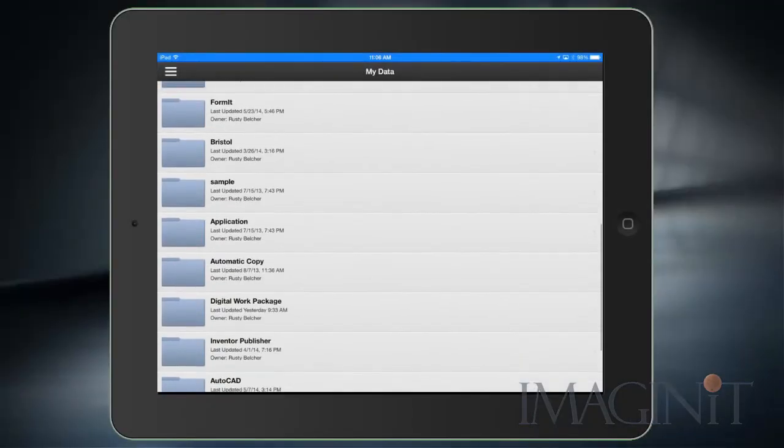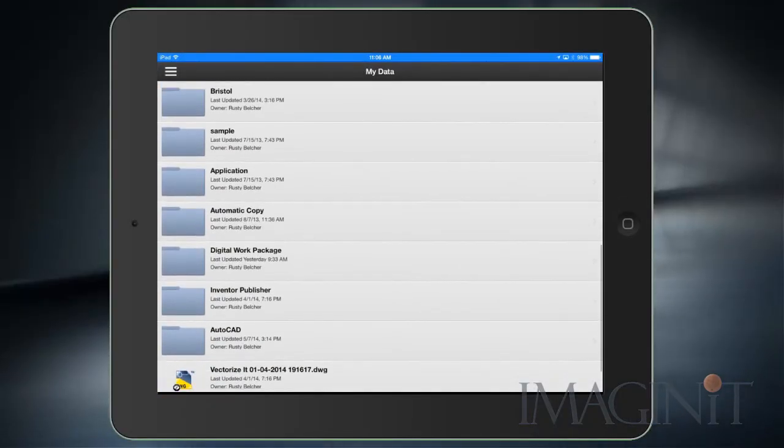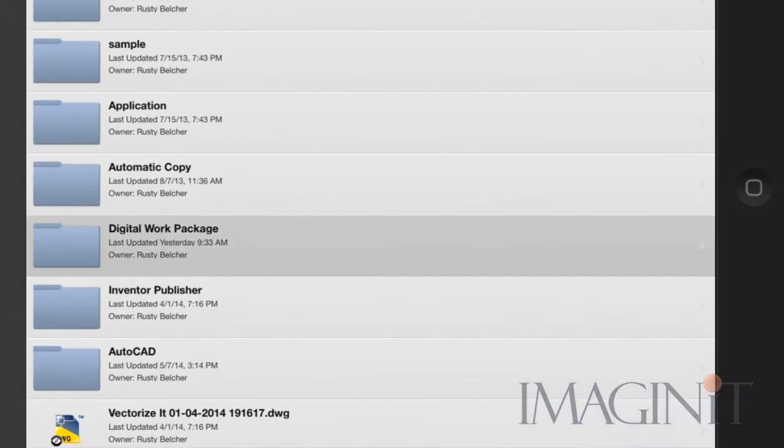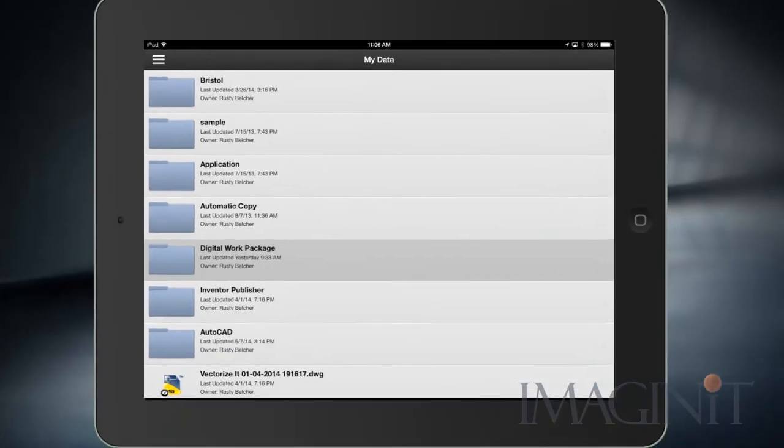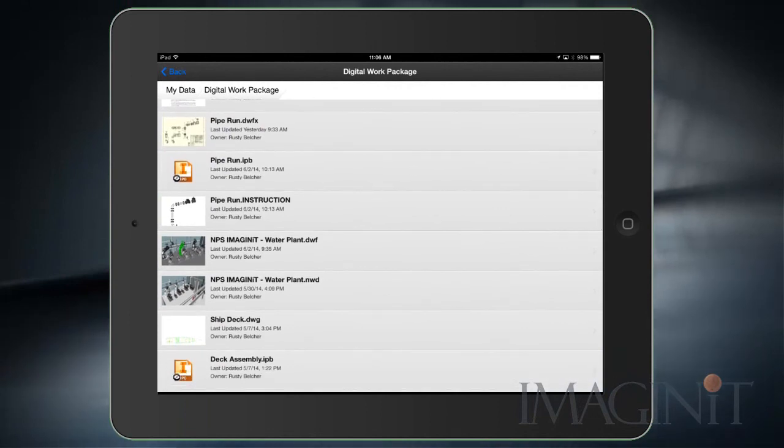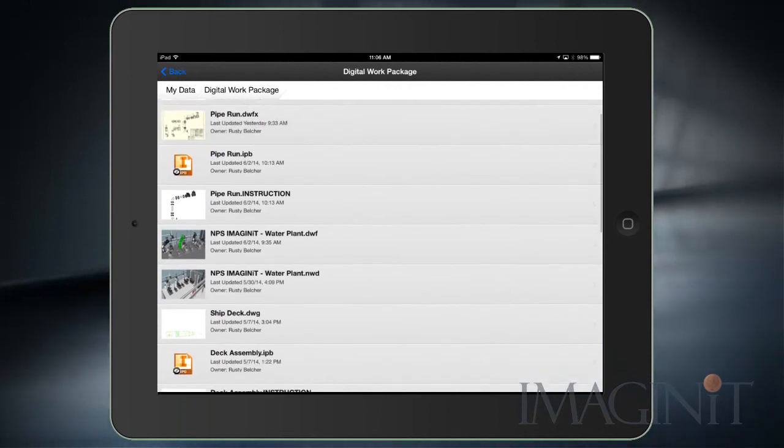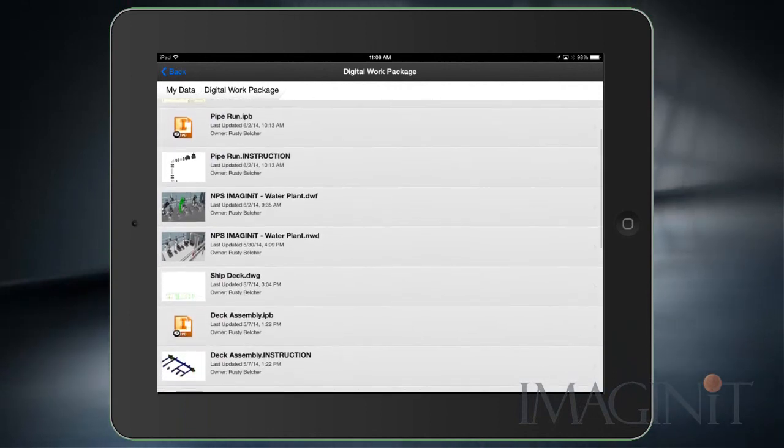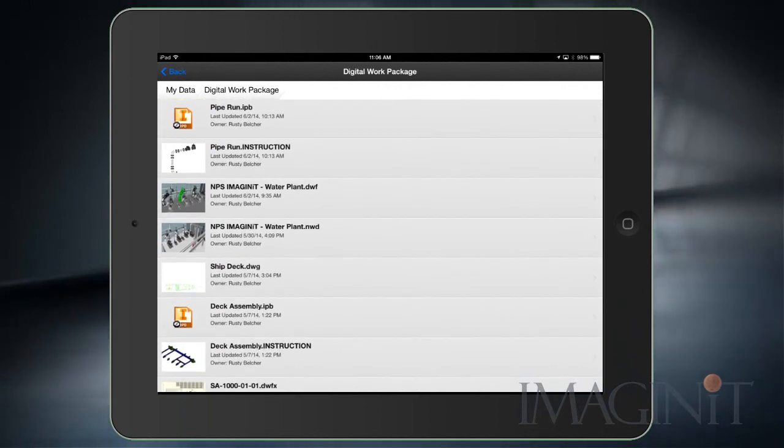When project planning is finished, the complete digital design can be combined to form a single digital work package. This digital work package can be published to the waterfront for use by all manufacturing employees.